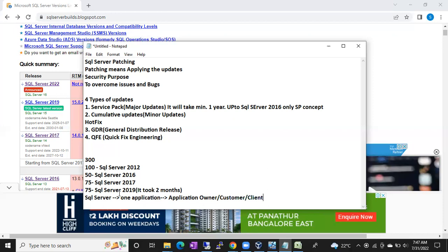It's very important to patch to fix the security and bug issues. So let us know what is the good time to patch the server. It's not like, okay, let's go, my manager gave me this server, let's patch. Nothing like that. First you have to ask the customer, then the customer will tell you one time, okay, you can patch the server on Saturday night 2 o'clock.